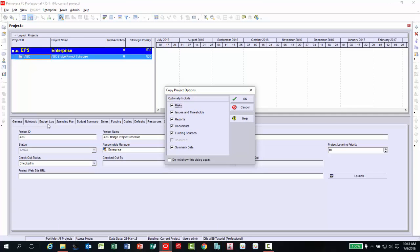Right-click again and select Paste. To make an exact copy of the selected project, accept the default options and click OK several times until the project is created.